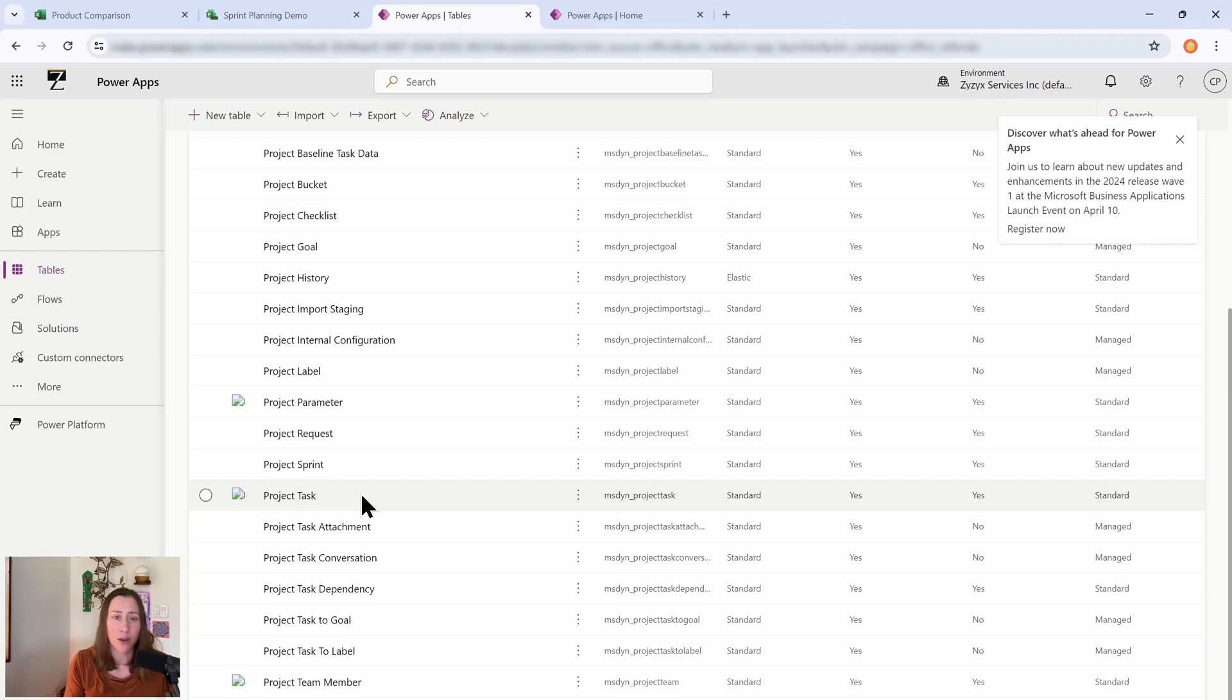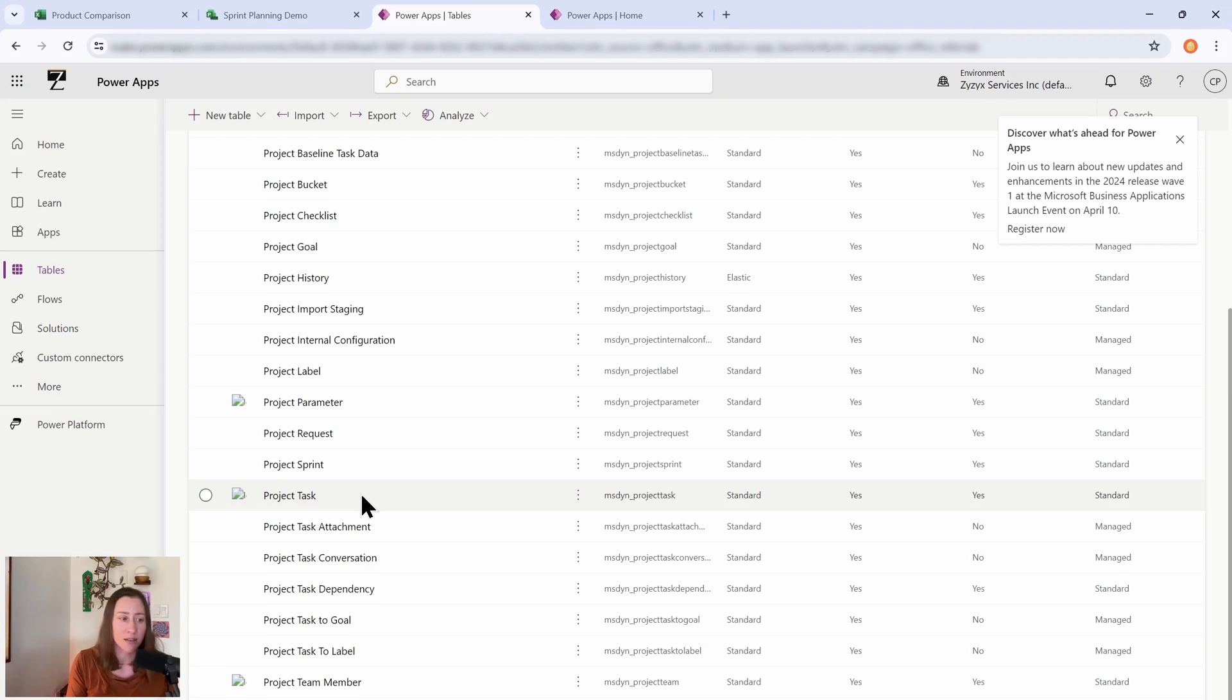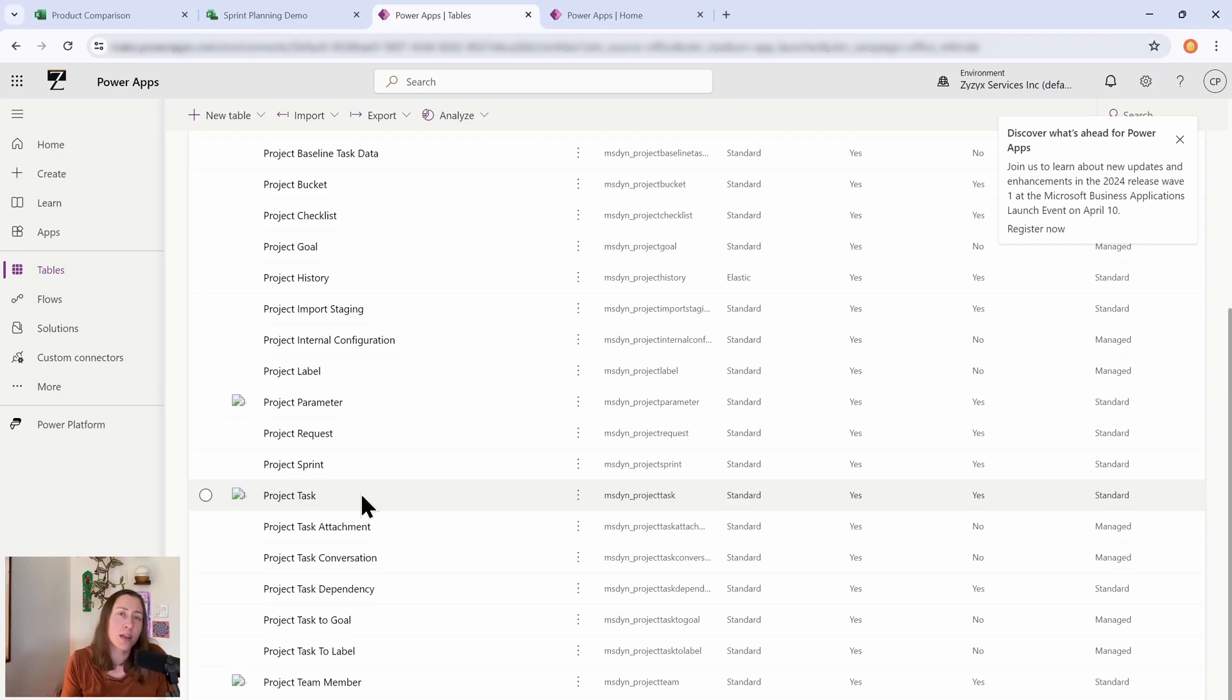And the thing about the project data is that because it's in Dataverse, it's using security roles and the security rules control what you can see in this table. So if you are not an admin user, you're going to see the tasks for the projects that you're a member of. If you are an admin user, you will be able to pull all tasks and all projects, say, into Power BI and do some organizational-level reporting on that.